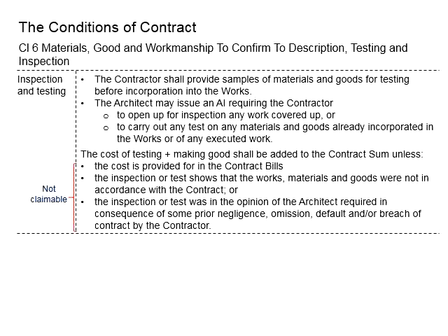When the inspection's outcome shows that the materials are substandard, the cost will have to be borne by the contractor. Or when the architect has reasonable doubt related to the honesty or the competency of the contractor, that means the contractor has a bad reputation, bad track record, or has precedents, making the request by the architect justifiable. Regardless of whether the outcome is positive or negative, the cost will be borne by the contractor.